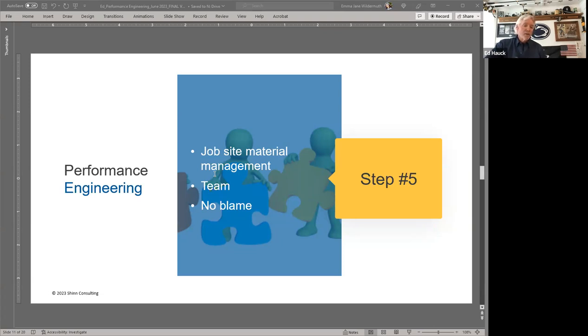And the reason why a lot of builders went to turnkey a long time ago is they weren't managing it. It takes a little bit of effort. What Kim's talking about is potentially, in some cases, depending on which cost code, for lumber, by the way, it could be anywhere from 5 to 15 to 20%. It's insane. So I have to understand and be good at managing the job site material.